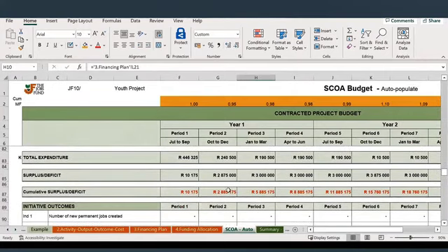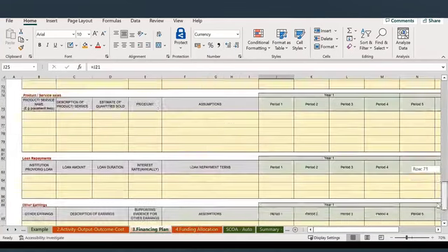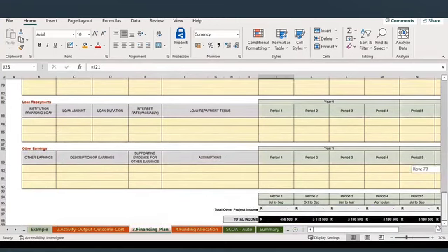surplus. But once you input your expenditure, please follow this line closely to see what kinds of surpluses you're running. Of course, we don't expect you to be down to the bone on a quarter-to-quarter basis because things happen, but we will generally look at how you are utilizing the cash you're requesting before we release other tranches of cash. So if I go back to the financing plan, yeah, I think that's all explained.